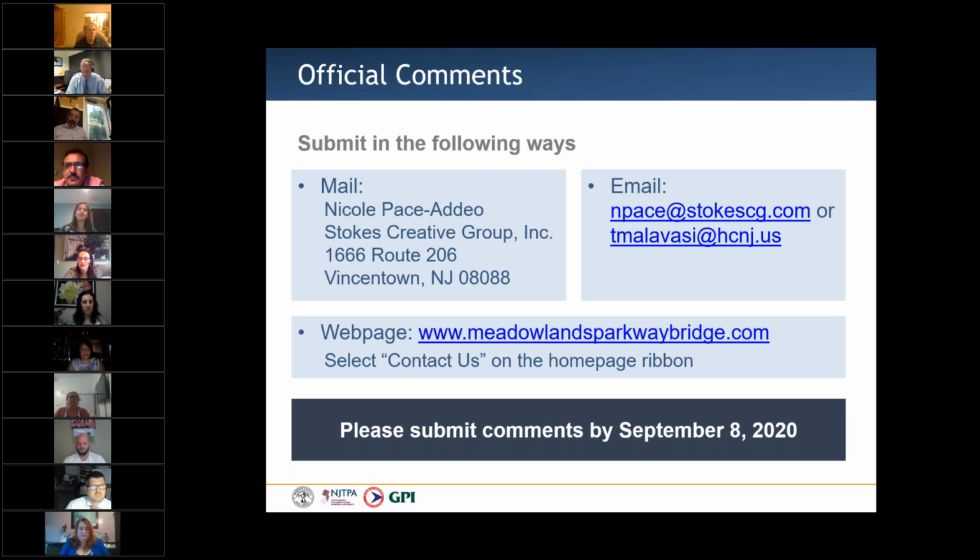It's like a car, you know, how much maintenance you want to put into it before you get a new one. And once again, I don't want to say we're going to replace the structure. There's also the rehabilitation option that we will look at. So if it can be rehabilitated and we can get the service life, Bill will calculate a life cycle cost analysis, and we'll determine what is the most cost-effective solution for the long term.